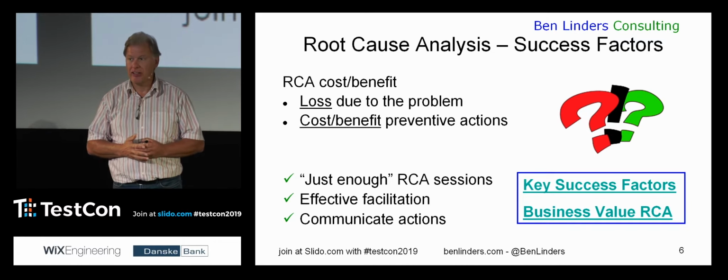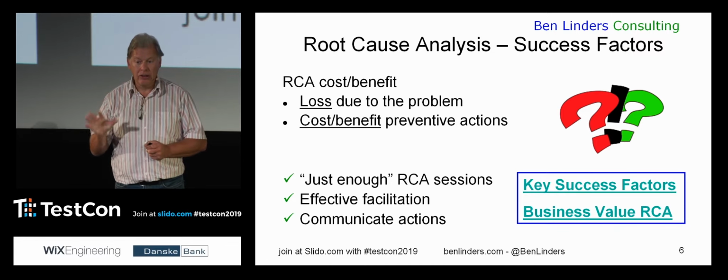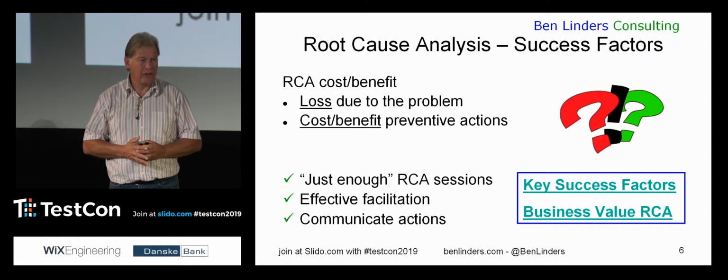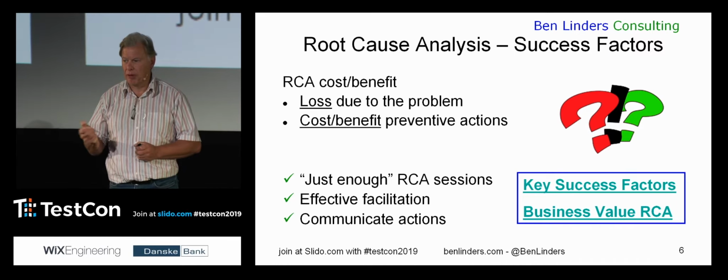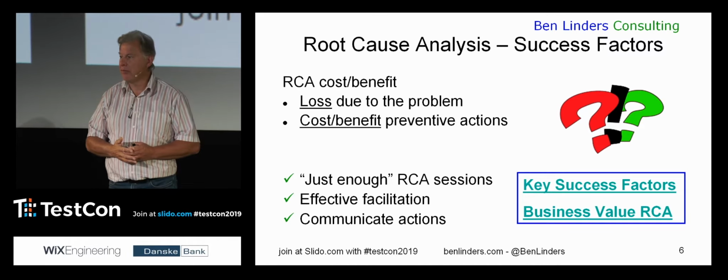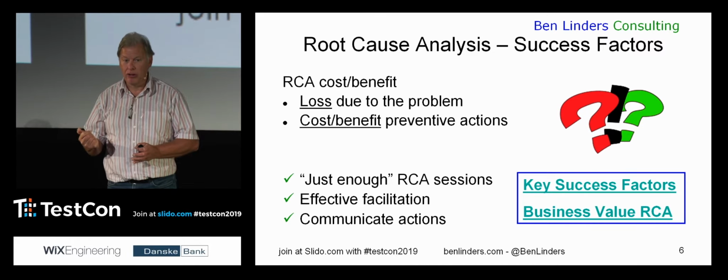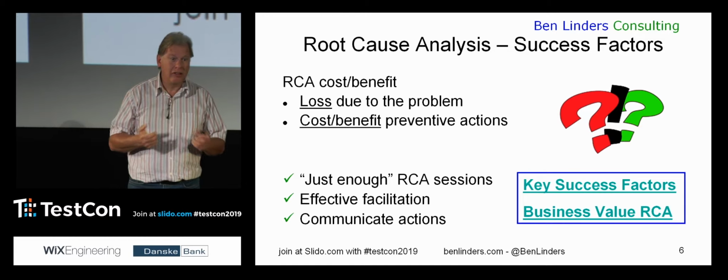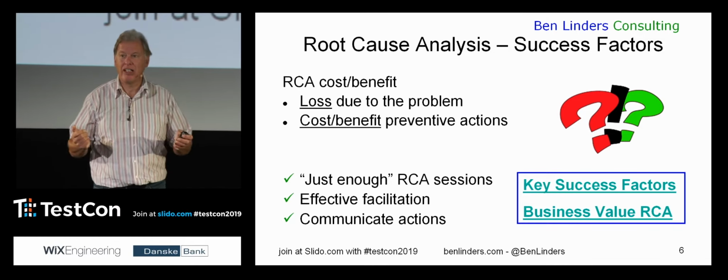And I actually suggest, if you're doing a root cause analysis, to always start with looking at how much money, how much time, how much did you lose due to this problem. And you're going to be amazed in a lot of situations where you think, okay, there was a problem, but if you start really summing up all the damage that has been done, all the hours lost solving the problem, maybe the damage at your customer side, your reputation.